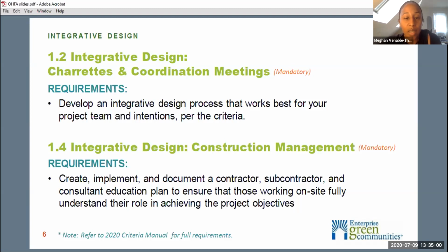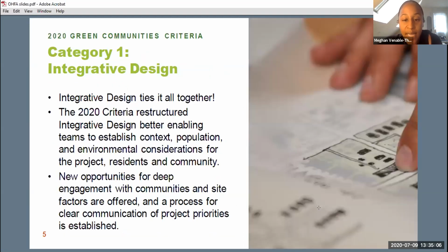So Michael Melko said, we've done early resident meetings to let residents know we're rehabbing their communities eventually, but that we're not exactly sure what we're gonna do yet. So we ask them to write down their requests and concerns on handouts, that we collect them and distribute to our architects once we hired them. Yeah, that's great, right? Like, you haven't even done anything yet, but already you're starting that process.